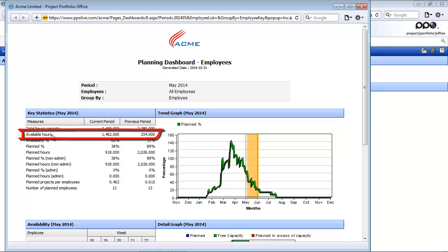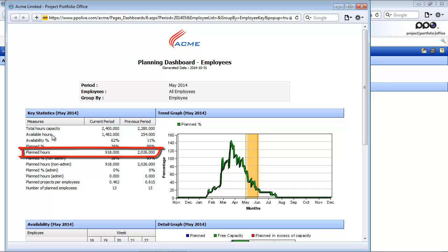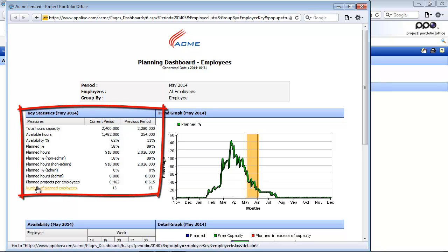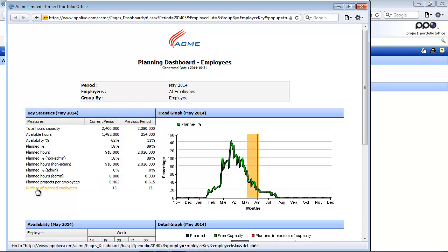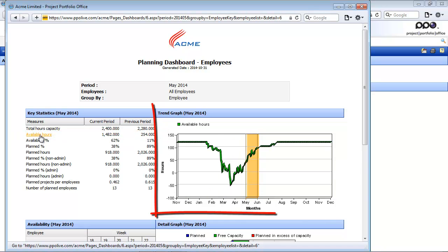The planned hours is the time planned by the users of PPO on those tasks, calculated by using the start and end dates of the task, as well as the percentage allocation and the responsible resource. You will also notice that you can hover over these different measures, and the graph on the right-hand side will change based on your selection. If I want to look at the graph by available hours, I can simply click on that measure, and the graph will update accordingly.